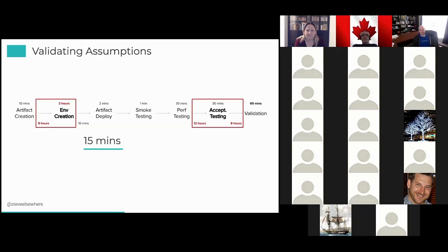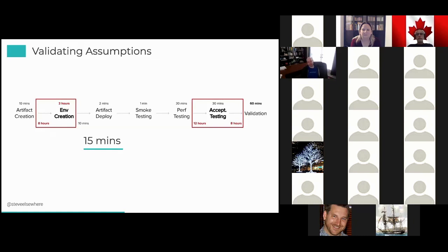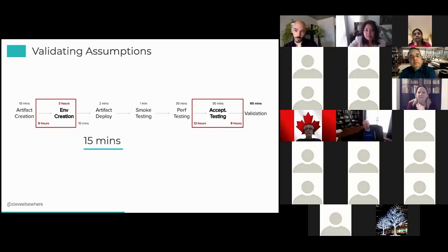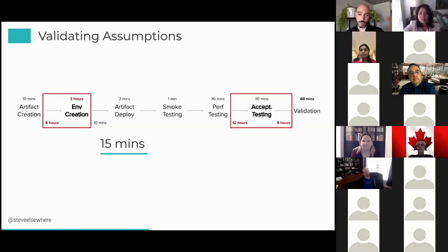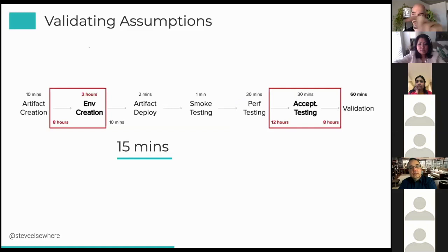They've already decided that they want to automate deployment, and it's based on maybe somebody else's benchmark, something they've seen in the industry, something they've decided is really important. So it's really valuable in the context of a value stream to put this in context and say, okay, if we were to automate deployment, we'd be saving 15 minutes. And we can see that there's a very big difference between automating deployment and the ROI that we would get by focusing there, and whether we were focusing instead on where all this time is being eaten up.